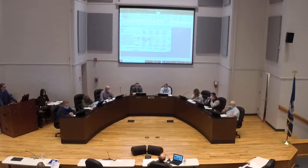So of the projects we presented, we're recommending that we move forward with, in addition to what you've already approved, $1.2 million for the paving and drainage improvements. The total allocation for all of these is $2.274 million, and that leaves over $1.1 million remaining at this time unallocated. And again, this is for discussion purposes. I can move these numbers around and change them, but I've prepared where I thought we were going with this, and I crafted the motions kind of fill in the blank for these projects.